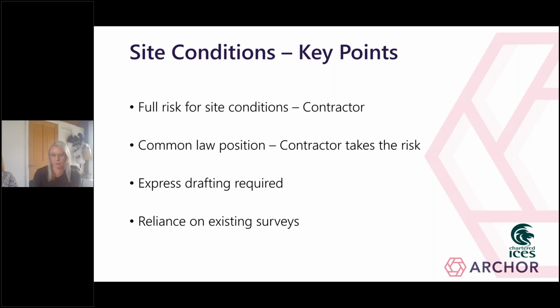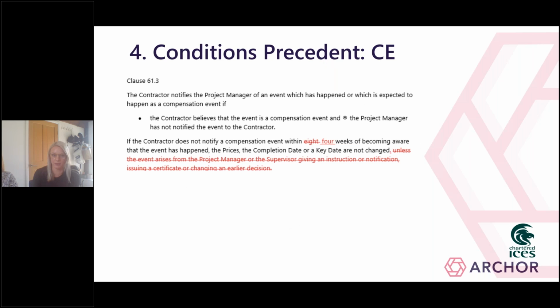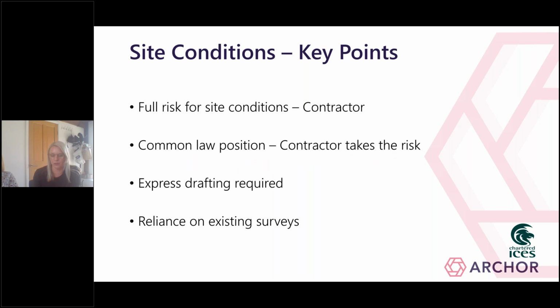As the contractor, if you're accepting a wide liability for site conditions and it's not feasible for site investigations to be carried out before the project is priced and programmed, in the very least, you should ensure that you have a direct contractual link back to the parties responsible for carrying out the existing site investigations. And that can be by way of a reliance letter, or a collateral warranty.